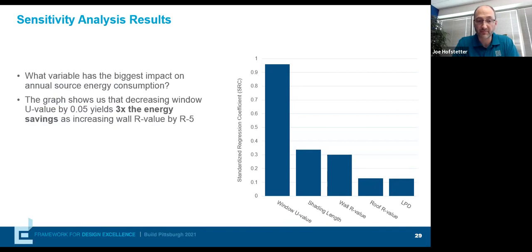At this early stage of the project, I think we're used to seeing a CM look at pricing as, okay, what kind of a bucket of money do I have for all of these different components of the building? I've got so much in for the skin of the building. I have so much in for the interiors of the building and the quality that goes along with that. Our mechanical, electrical, plumbing systems and how much cost per square foot I'm going to include on that.